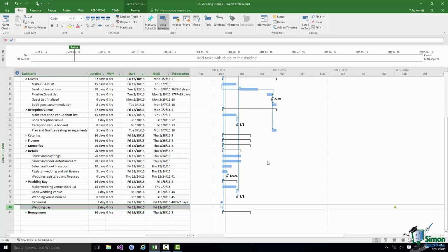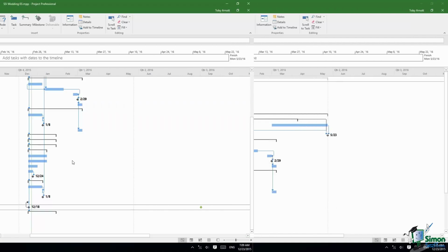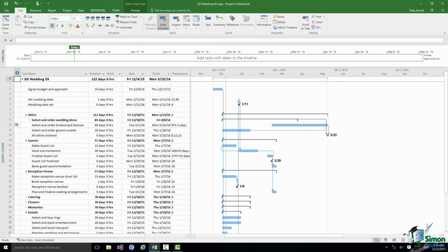Click on OK. The task is now marked as a milestone, but as you can see its duration is a day and there will be work for people to do on that day. Let's hope they don't think about it too much as work, but as far as Microsoft Project is concerned, it is work. So there we are, we have some milestones in our project. I'm going to take a look at those in just a moment.